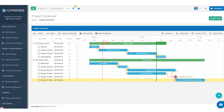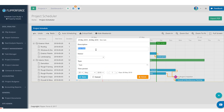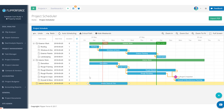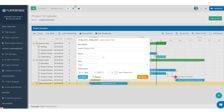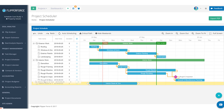Now we're going to do doors and trim. We've got raw drywall on the walls, door openings without trim, and we may have had to remove baseboard throughout the property, so we need to install new door trim and baseboard. Let's call this interior doors and trim. This is probably going to take three to five days — if you're removing all existing doors, installing all new doors throughout the property and installing baseboard in most rooms. Let's change it to five days just to be safe.